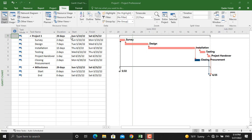The primary reason that we use leads and lags in our project schedules is that we want to either fast track our project schedule where we can perform different activities in parallel, or in some cases we might need a break or some amount of time until we can start the next activity.